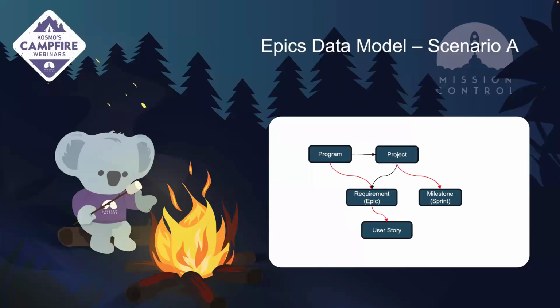In this scenario, where you're building out your requirements and your user stories first, you might do that because it's a much larger piece of work. It might be getting delivered across multiple projects, and your user stories are then going to get allocated to appropriate sprints within separate projects. What you can then do is convert those user stories, using the project builder, over to actions within an individual sprint on a project.